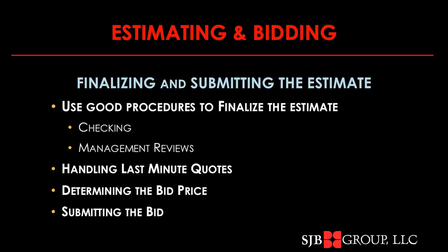How do we handle those last minute quotes? A lot of times, if you've got a lot of pay items on a given pay project, a contractor will close out, meaning finish all of his calculations, et cetera, on all the pay items except for the last one or two. The DOTD mobilization item is usually a good one for this. And that is the last number that gets finalized. So with any of these last minute phone calls, and the guy walking in the door, saying, whoa, I got a big cut in my price, you can accommodate that in a place that's manageable.